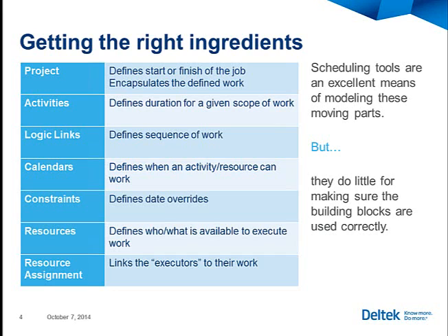Now, there's a right way to do this, and there's the not-so-good way, which we'll be talking about in a few minutes, which is why we don't assign dates to activities. In fact, you won't see the term dates listed as one of these items on the left-hand side. We want the dates to come to us by determining what the activities are, how long they take, and what sequence they should be performed in. And that brings us to calendars, as we're talking about dates, which is when I have resources available to me.